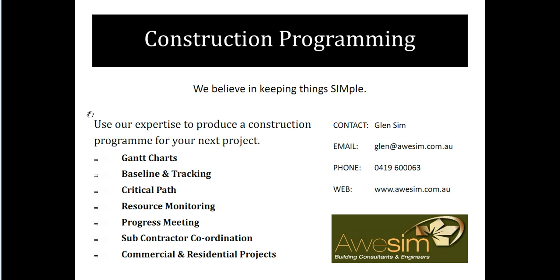We produce our programs on Microsoft Project. This produces a Gantt chart view of your project, which is tailored to your project. Within this, we can offer baseline tracking and monitoring of the project. We highlight the critical path, and in the background we can monitor the resources and costs. These are presented at progress meetings with the stakeholders.